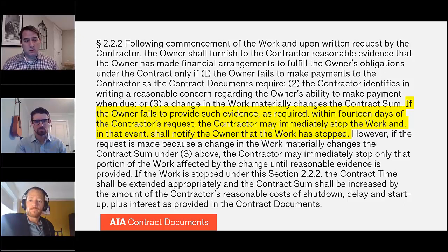Yeah, it's a written notice. If anyone cared enough to compare the 2007 version of the 8201 to the 2017 version, you'll note that every time we wrote the word notify or notice, we would qualify it with the word written. And then in the 2017 documents, we made a concerted effort to avoid writing written over and over again. But the requirement that the notice be written is still there, because we added a section that says all requirements to notify the other party or all requirements to provide notice must be in writing.